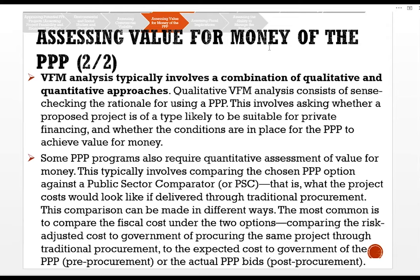The public sector comparator represents what the cost would look like if delivered through traditional procurement. This comparison can be made in different ways. The most common is to compare the fiscal costs under the two options — comparing the risk-adjusted cost to government of procuring the same project through traditional procurement to the expected cost to government of the PPP, either pre-procurement or based on actual PPP bids post-procurement.